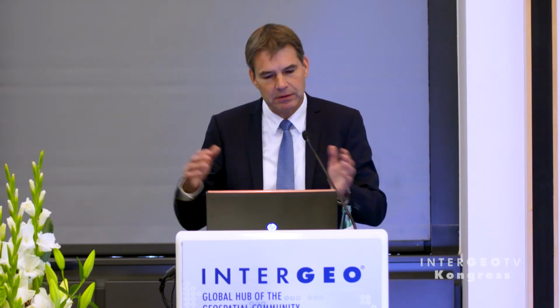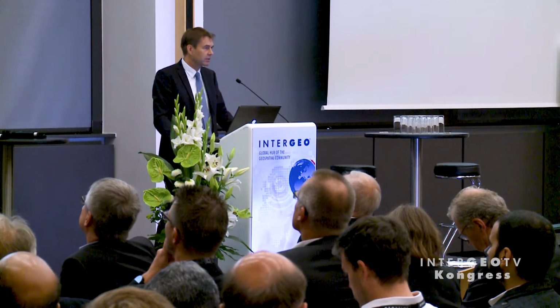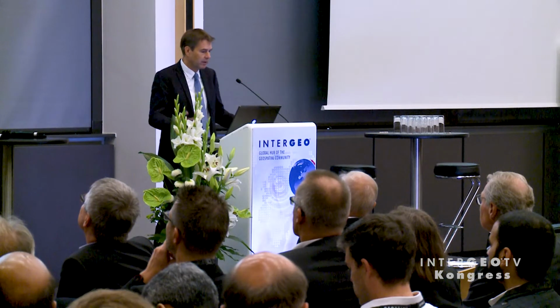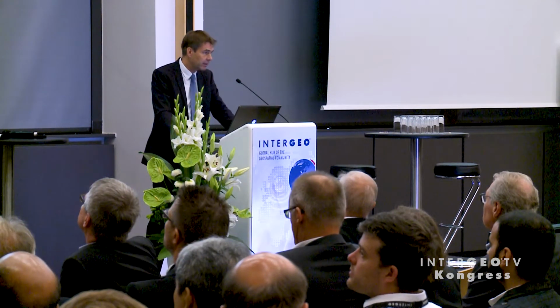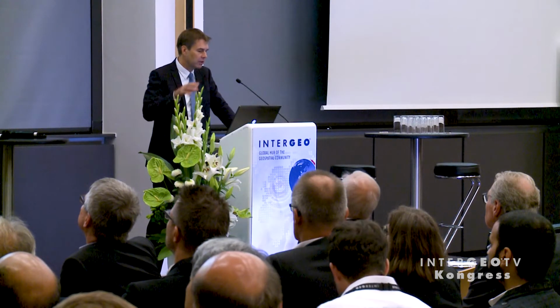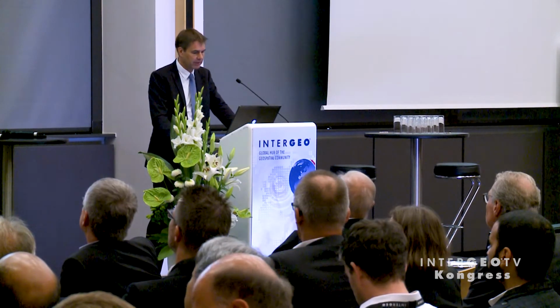Beside this, from the pre-construction as-built to the design and ending up at the stakeout and control, what we have additionally for the surveyor is a lot of visualization is requested. So that can be done by the designers, but very often the surveyors are asked to help with this. So visualization for several applications, not just to talk to the people in this area when there's a construction project, it's also about logistics on site. So when you plan a large site today, you have much deeper planning. You have a 3D, 4D, 5D planning, so time and money. And this goes along with visualization in which stage of the project I will have which logistic areas.